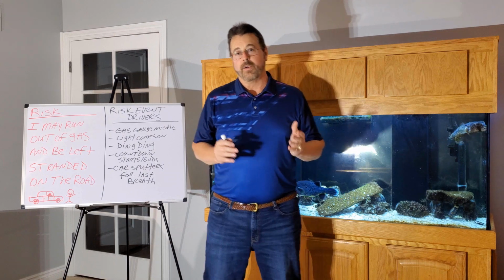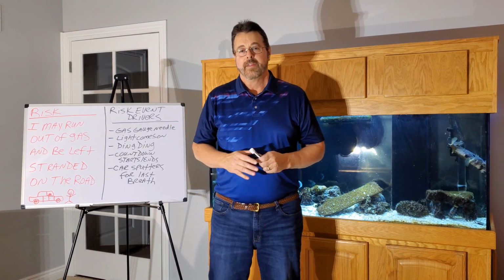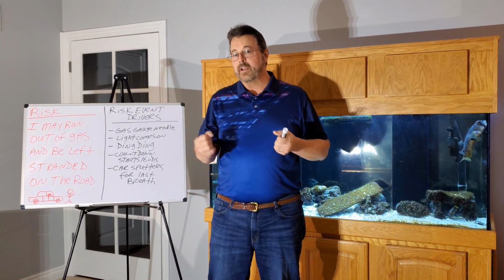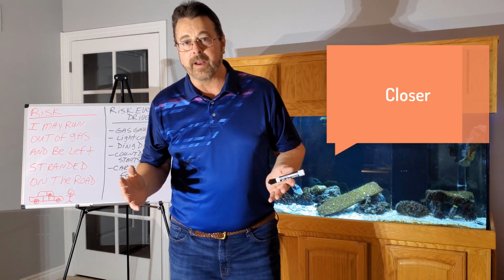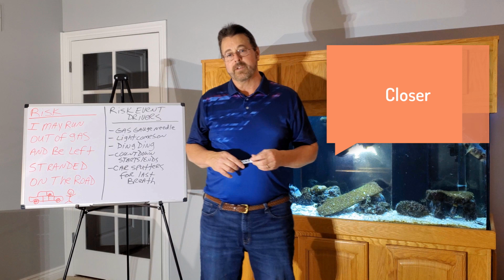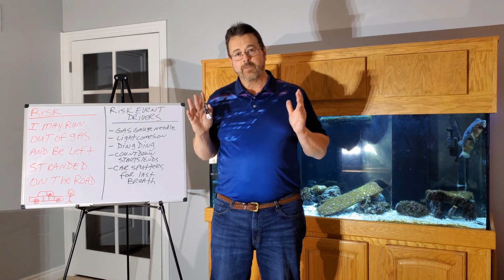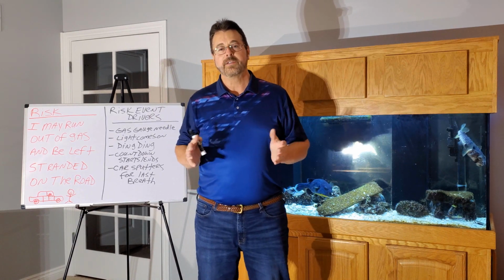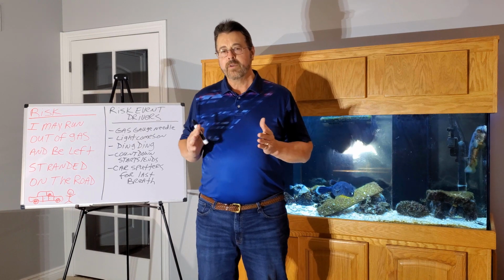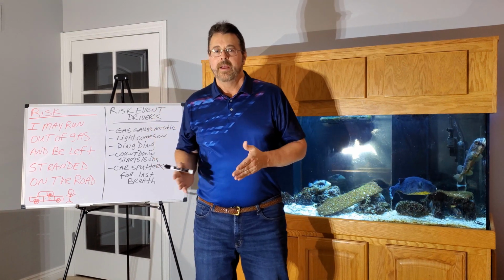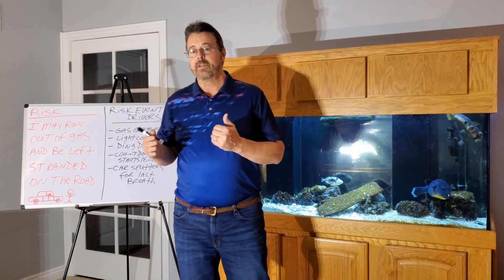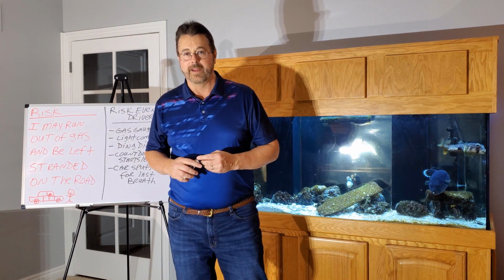So as you can see, there are a whole lot of things that happen that give you indications that you're getting closer and closer and closer to the risk actually occurring. These are what we call risk event drivers. So for every risk, you should take some time to think about what are the drivers or the things I can watch that help tell me that this risk is becoming closer and closer to becoming a reality.